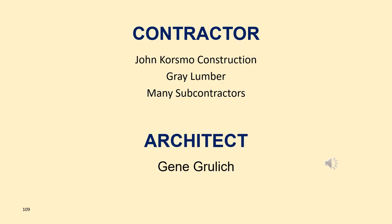The lead contractor after the fall of the home, as I noted before, was John Korsmo Construction, and they contributed in many ways, but one of the most important was in the flexibility on billing and payments. They carried us many times while construction continued and we were behind on payments and until we could catch up. John worked with Gray Lumber, who also made many contributions in terms of materials to the project, and John accessed many subcontractors who also assisted with the project. The architect for the project is Gene Gerlich, a noted historic preservation architect in the Puget Sound area. Our thanks to all of them.